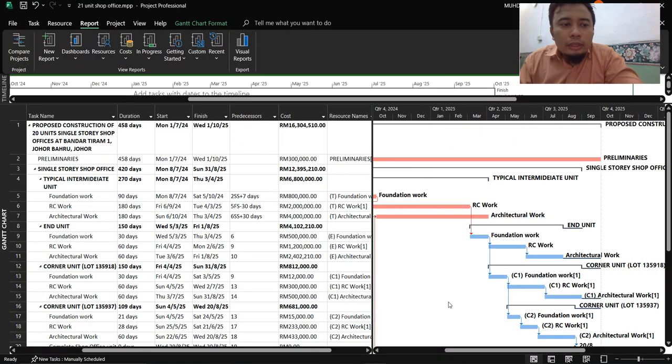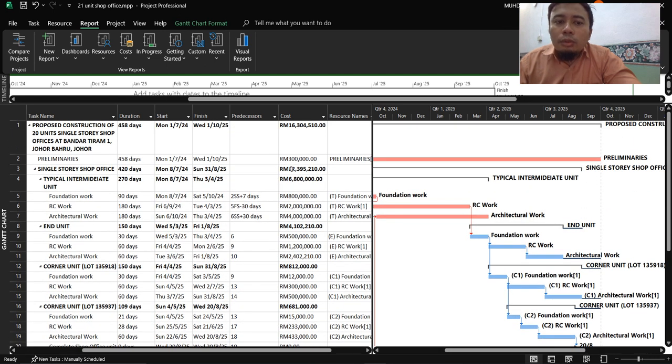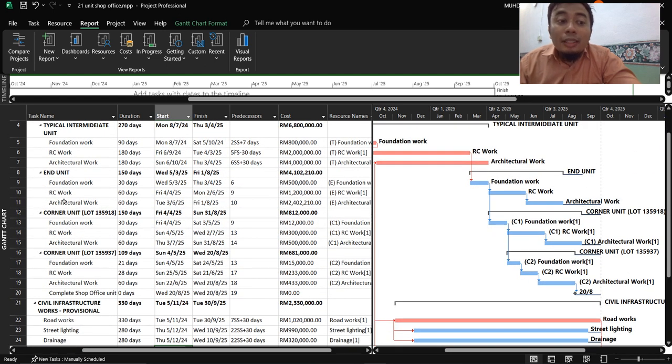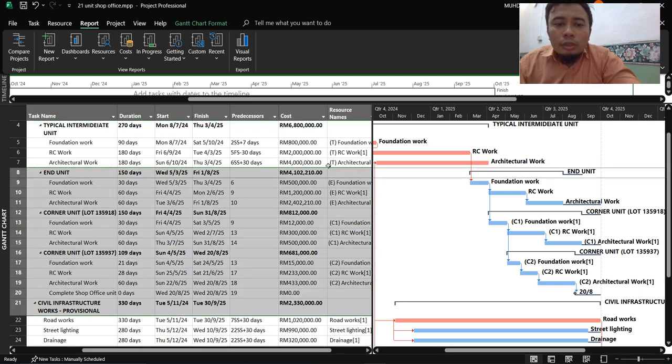So that covers the S curve. First you need to know which are the critical tasks, and then highlight the slack time. Also identify the non-critical tasks. Highlight the cost. You want to know the cost, because if the task is not costly, it won't affect your S curve much.